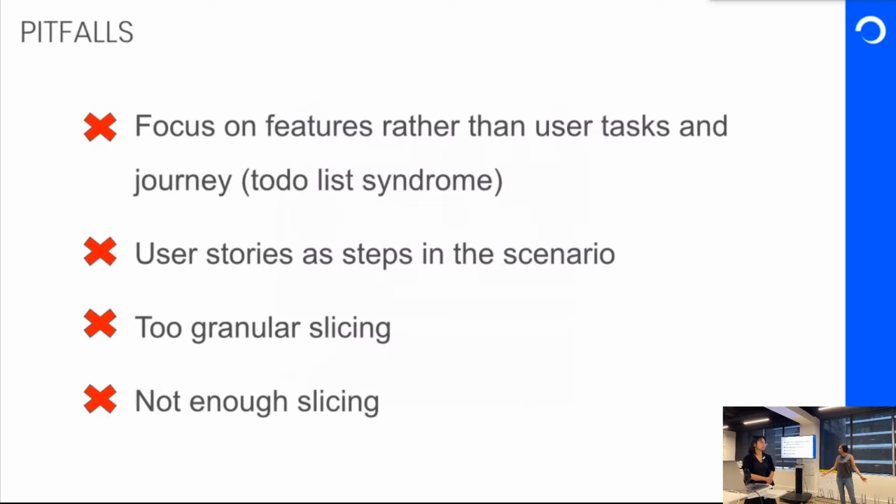It can evolve. Even during the delivery time, you can identify that there is a key aspect of the user journey that you might have missed. Like maybe we did not think about the after-sales part of the journey. Maybe we forgot about capturing reviews and feedback from our customer. And then you add those kind of aspects to it, right? So user journey map is always evolving, right?